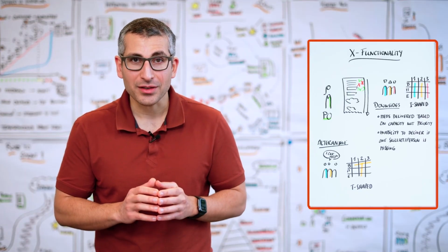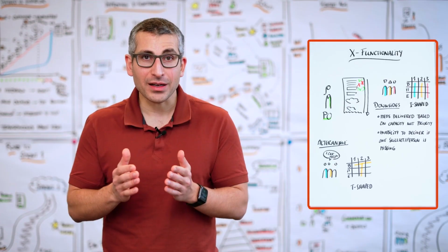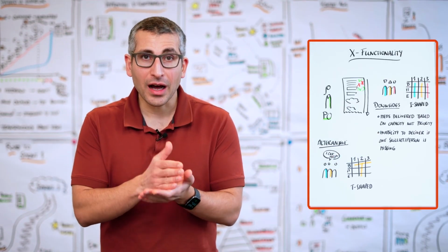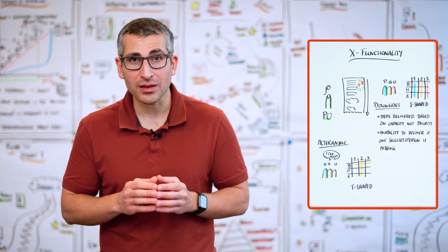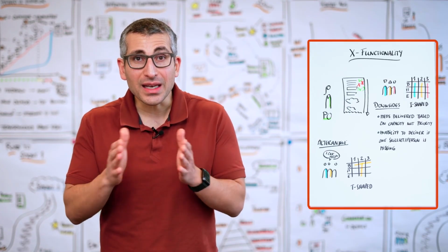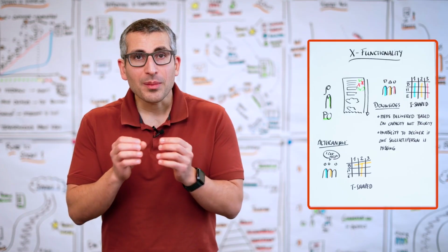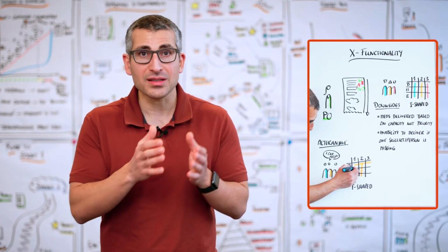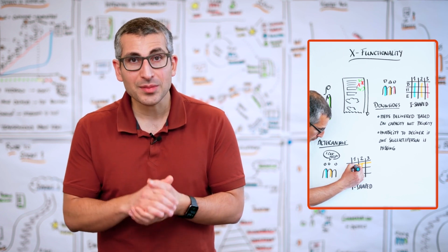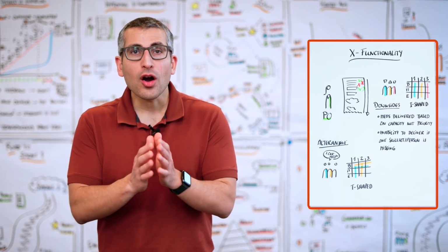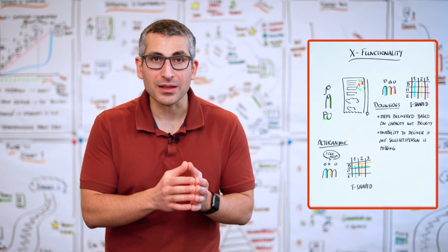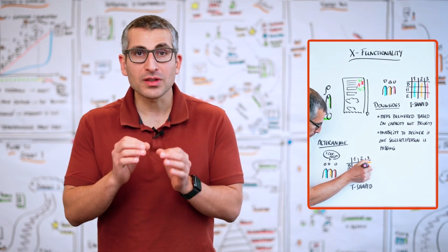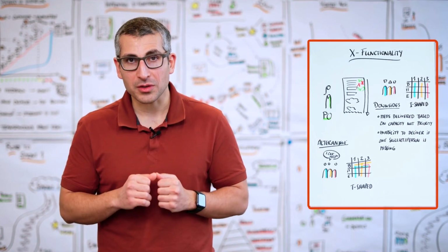Looking at the second challenge, where one team member missing resulted in us not being able to deliver anything unless we would dilute the definition of done, we can again see that if any one of our team members is missing, because the others have a basic level of understanding in terms of their skill set, still many items can be moved to done. Of course, we will lose speed, but still we're able to finish stuff. Still, we're able to deliver value for our customers.